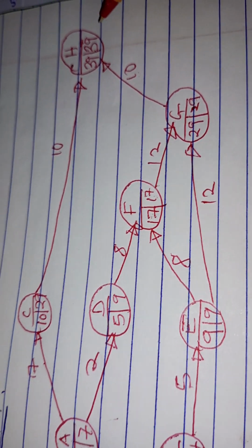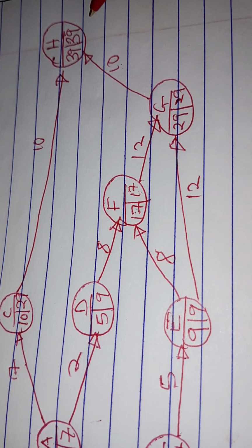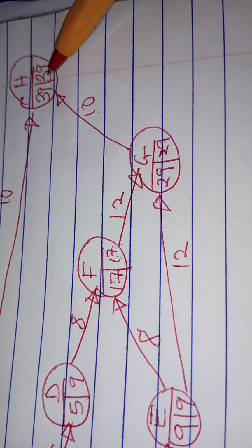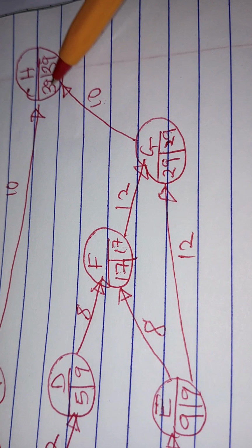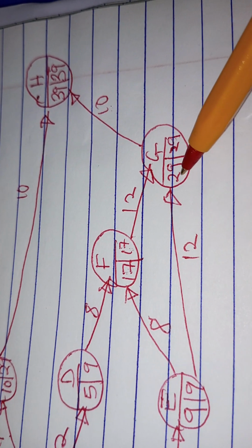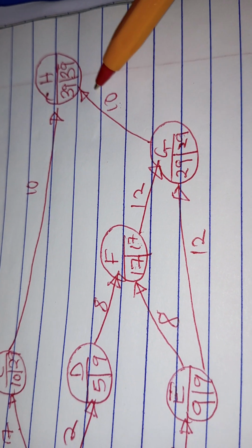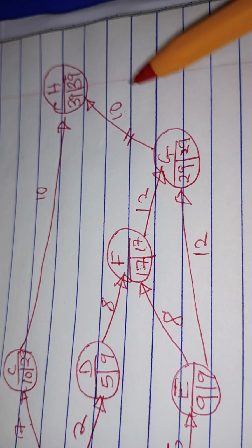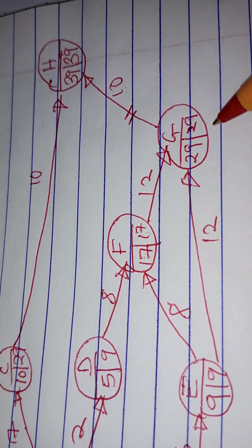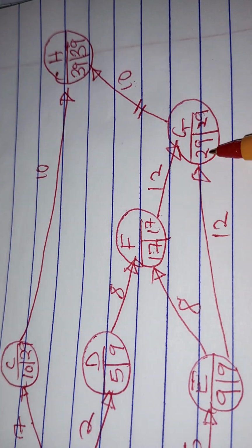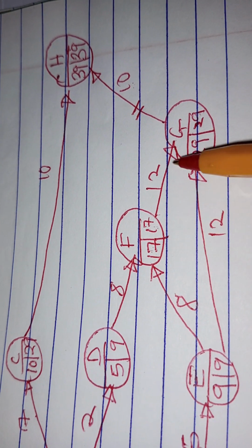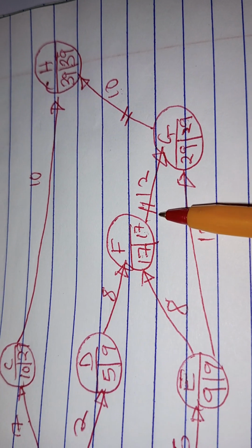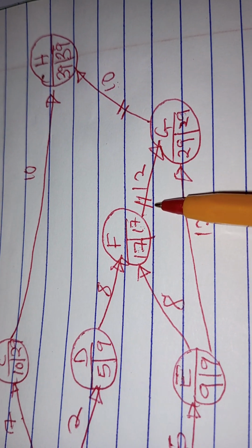Now, the critical path will be seen by having the same numbers in every activity end. The end or finish will have the same number. So we have that 9, and we have 29. So this is the critical path, and we shall indicate that by having two parallel lines across that activity. You also consider 29 and 17, and this is also another critical path line, and we should indicate it using the two straight lines across that activity.